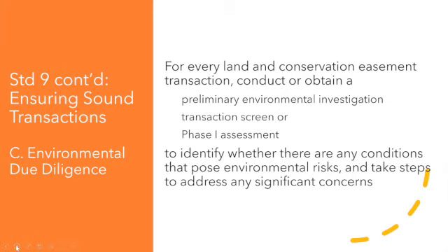For example, past human occupancy might mean there's a buried oil tank or other potential contamination of the soil or the water. Older structures on the property could harbor hazardous substances like asbestos or lead. Past farming might have contaminated soils with herbicide residues that might need restoration prior to hosting a community garden, say. Land use practices on adjoining or neighboring properties can also impact the property's environmental resources or pose continuing risks.